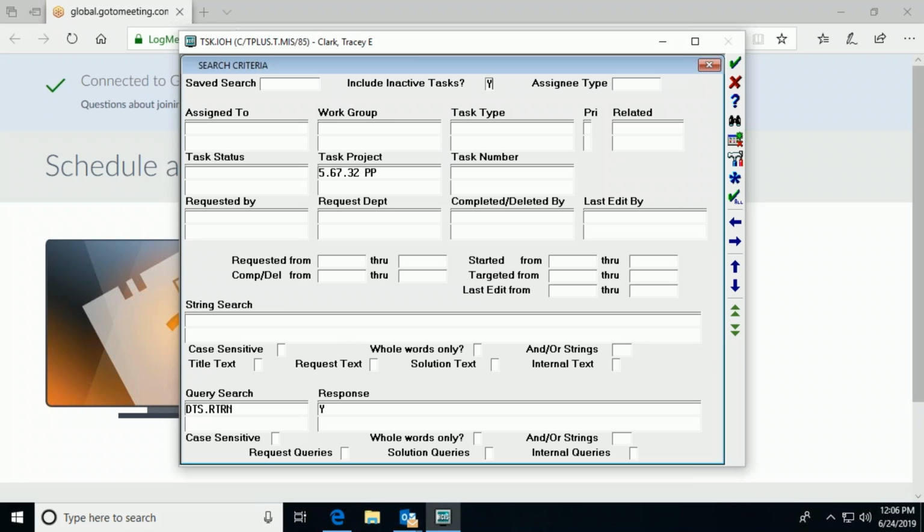So if I wanted to gather those up at the very end, and really important here, I would probably do that, because as I'm getting to the end, many of the DTSs are completed. So I want to make sure I find anything with a yes to that query, whether or not it's completed. Does that make sense? And then that list might be something I'll want to print out, or if I'm the training coordinator, I might want to add myself as an other assignee on those DTSs so I can find them and work on them.